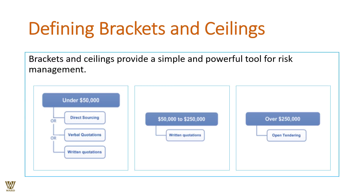Bracket and ceiling thresholds provide a simple yet powerful tool for risk management. For example: anything under $50,000 can be purchased directly with a verbal or written quotation. Between $50,000 and $250,000, a written quotation with a minimum of three bids is required. Over $250,000 requires open tendering — publicly announced and publicly procured. These thresholds illustrate what risk management is all about.